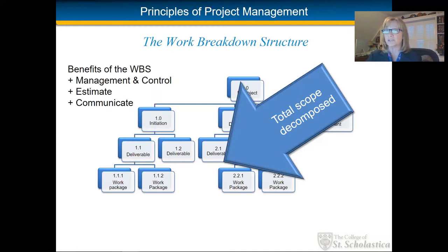As you can imagine, a project WBS has many benefits, but it does take time. For complex projects, there could be many stakeholder groups involved in the process, so it always helps to have someone with experience in developing a WBS to facilitate the process. The output of this process includes the project scope statement, the WBS, and the WBS dictionary, which is a document that provides detailed deliverable, activity, and schedule information about each component in the WBS. This process output becomes input to the project time management process.